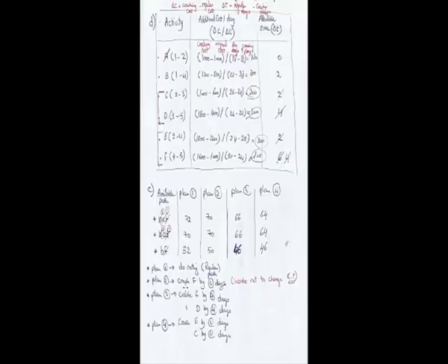But if we crashed F by 6 days right away, it is going to make us lose our critical path, because if we crashed F completely, 72 days minus 6 equals 66, which makes the critical path AEF less than another path available, which is ACD.